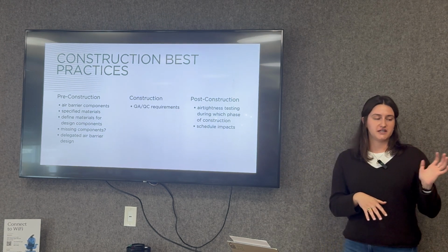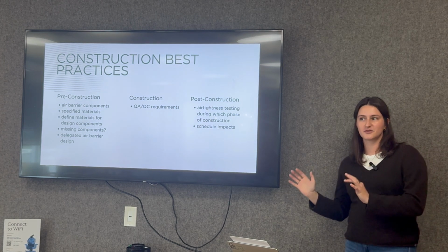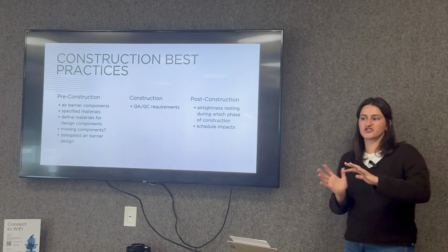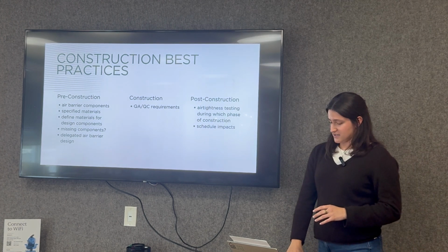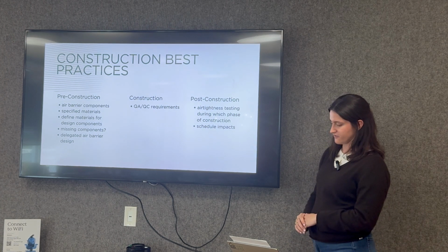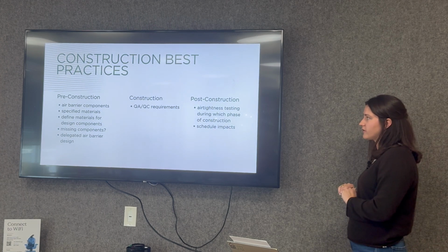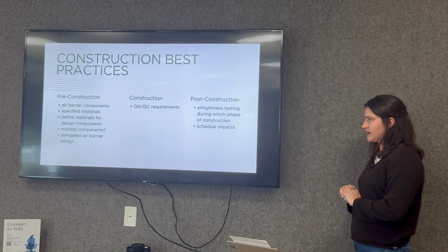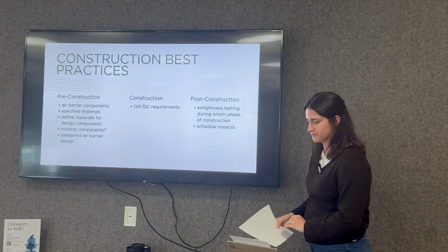Or in new construction, it typically happens either on the weekends or after hours when everybody else on the site has left for the day and only the lucky few are there to get to see the test. So the two most important questions before construction is complete that we need to answer are who's responsible for integrating the air barrier materials and who's undertaking the risk and responsibility for it, maybe without knowing.